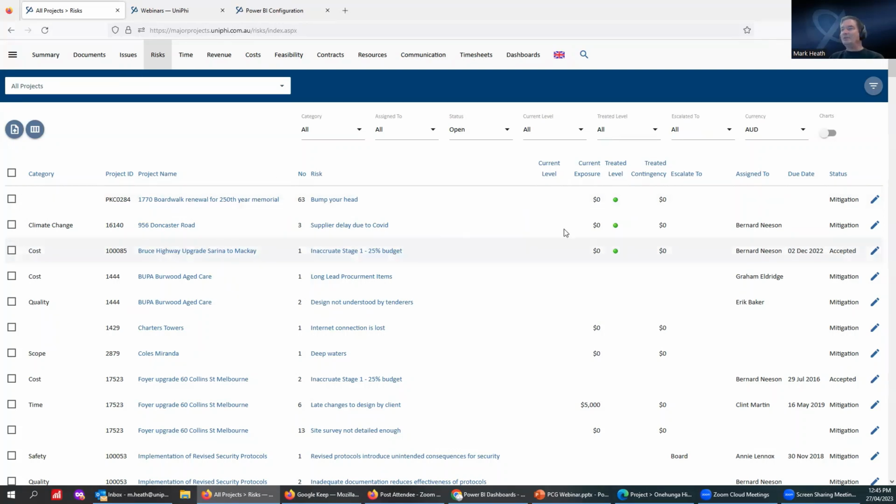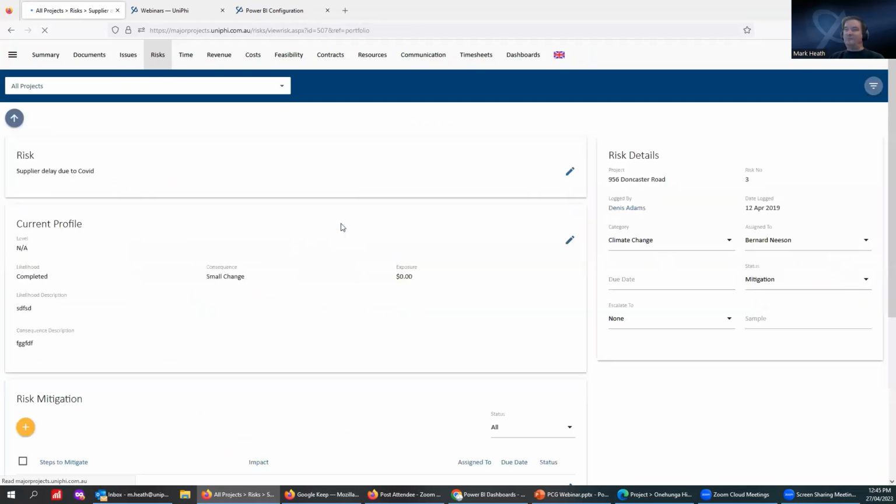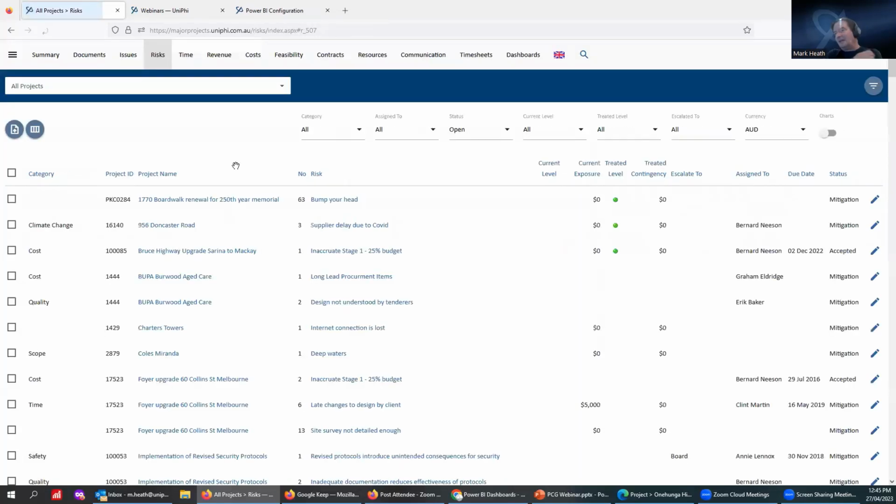So again, you need to configure the risk matrix, you need to configure the categorization, and then you need to get the escalation levels as well, which I imagine would be the same as the issue system. And then you need to get people to get that data into the system, which, if it's happening outside by a risk team when we functionalize these things in projects, you still can import it in for the dashboard and for the progress reports. So yeah, they're the sorts of things.